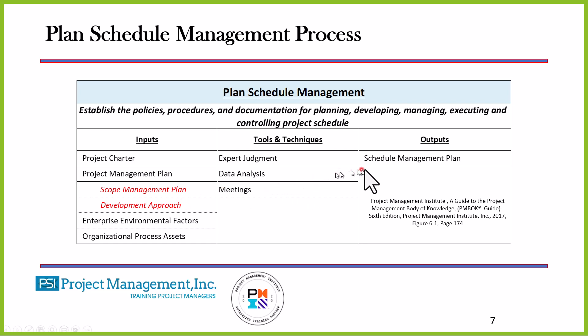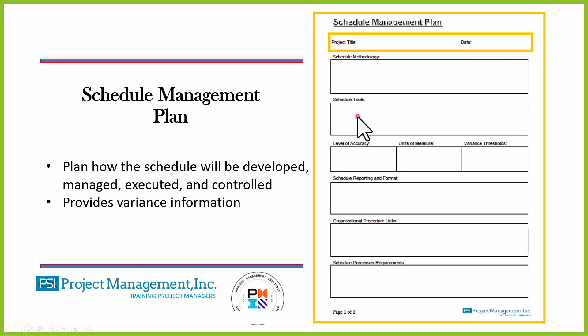As an output of this process, we have the schedule management plan. The schedule management plan tells us how the schedule will be developed, managed, executed, and controlled. It also gives us the level of variance information — we may have a threshold, and as long as we stay within that threshold we don't have a variance. If we exceed that threshold, we have a variance and must take action through a change request to correct it.